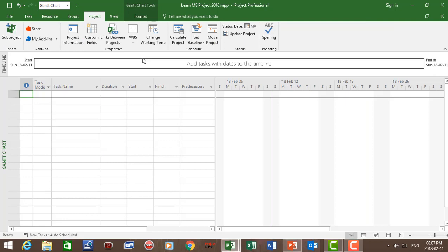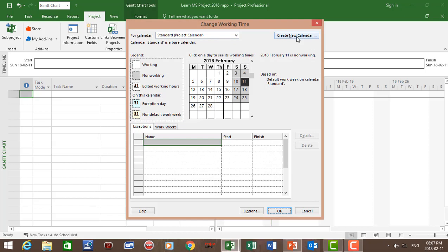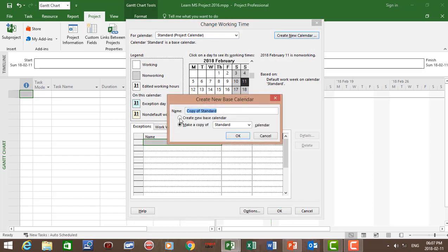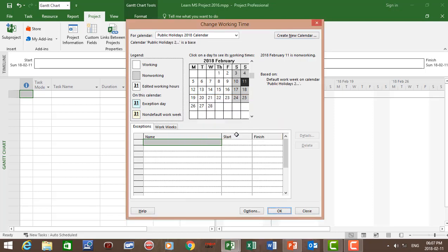Now first of all let's create our base calendar. Go to Project, Change Work Time, and click on Create New Calendar. Create a new calendar and give it a name: Public Holiday 2018 Calendar. Click OK.